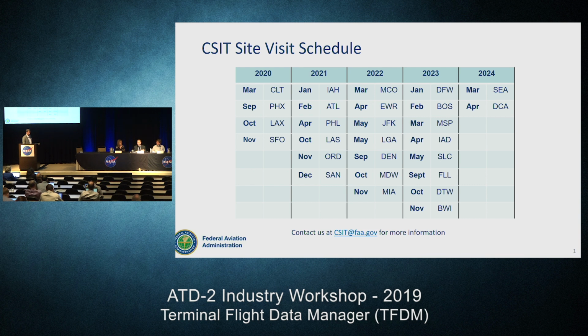So it's not a simple matter of just moving a site up because it's growing. The sites were laid in, and the waterfall was coordinated to manage the resources around the country. We took into account not trying to overload any particular part of the country at the same time because of the resources available to do the site prep. We have to coordinate the training at each individual facility. So it's not a simple case of just moving a site around.